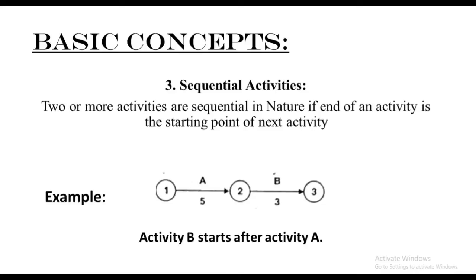So whenever there are sequential activities, the starting point of the second activity will always be the end point of the very first activity. Now all these concepts are very important while drawing the network diagram.